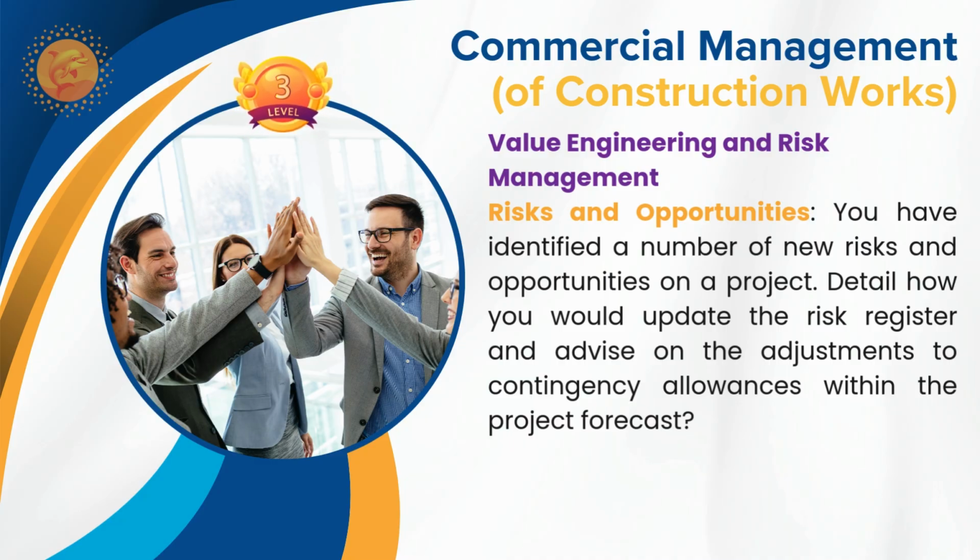So this is only based on the method that is available to you as a commercial manager to have it as an opportunity to the project. But some risk may arise when you are thinking about material availability or skill availability, particularly for certain aspects of the construction elements, that are going to be new risks which were not addressed within your tender allowances.